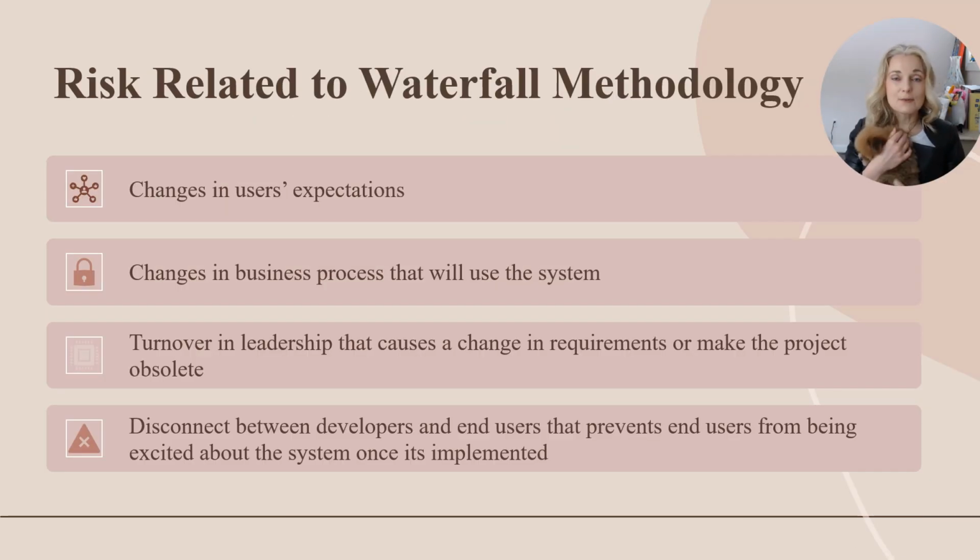There are some risks related to the waterfall methodology. One is that if users change their expectations, those changes can't be easily integrated into the system, because remember, you're going in a linear fashion. Changes in business processes that use the system, once again, create issues within the system.